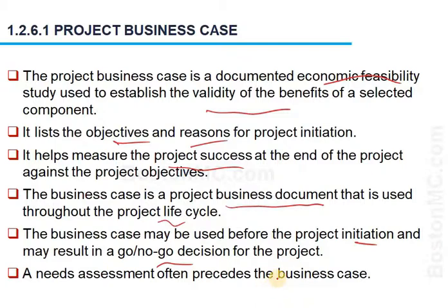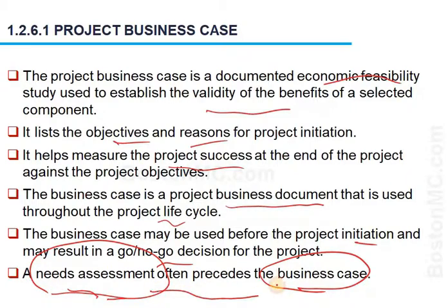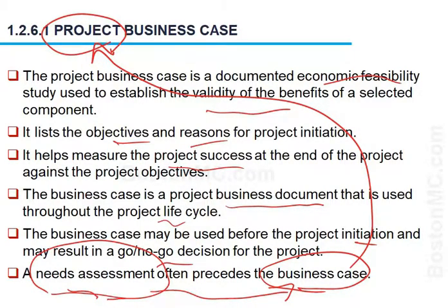Speaking of needs assessment, usually a business case is done because management has a need, a business problem, or an opportunity that they're looking to capture, and for that a needs assessment is done and it's presented in the form of a business case. When a business case is approved, then that is used to initiate a project. So that's usually how it works.